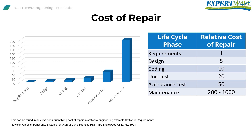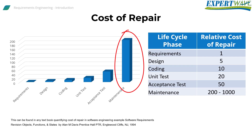Cost of Repair. As a result of faults in the requirements, there is a high cost. Imagine if you have a fault or a bug in the requirements and you find that fault while still in the requirements phase — the cost of fixing it may not be very high, and the duration to fix it will be very short. But if you only find that bug when delivering the software to the customer, the cost may end up being 100 to 1000 times higher. Therefore, requirements need a very high level of effort to prevent any faults from occurring. This is why we emphasize the importance of requirements and make sure that they are correct from the beginning to avoid such problems.